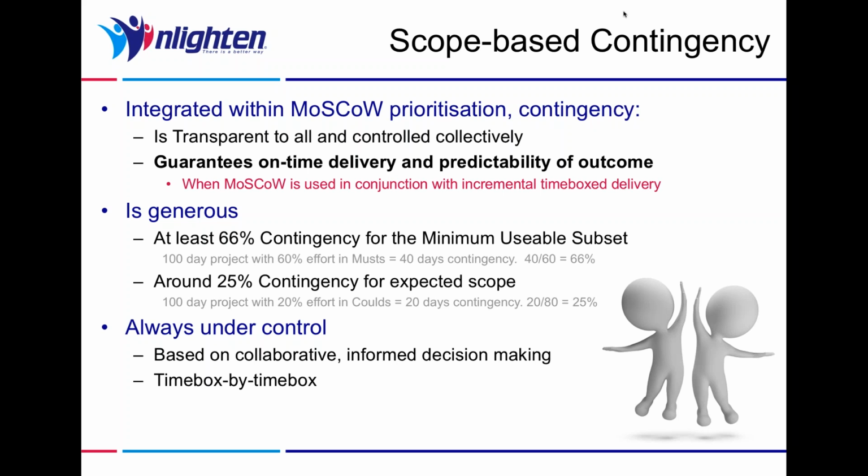So what that means is we should estimate how long we think it's going to take our project to complete. We do this roughly and at a high level, and we come up on that basis with our time and cost estimates. It should always be technically possible to do all the work within that time frame and that budget. I say technically possible, so we've estimated it and it fits. Yeah, that's all I'm saying. We know full well that the world will have an impact on our project and we're going to need some contingency.